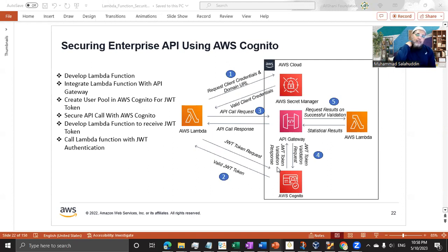So if I take this example in this solution, the very first thing is I can still build my code, but I know that in order to finalize it, I need the Secret Manager to be set up to store my secure information. Without that, I cannot release my solution into production, right? So it creates a dependency, and I know I need the time of my infrastructure team who's going to help me set up this Secret Manager.